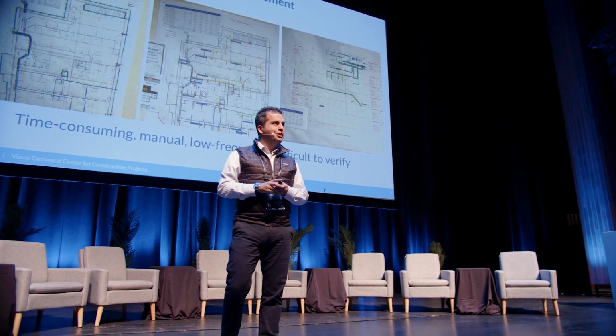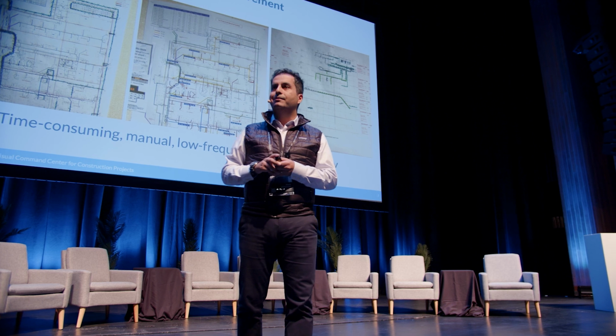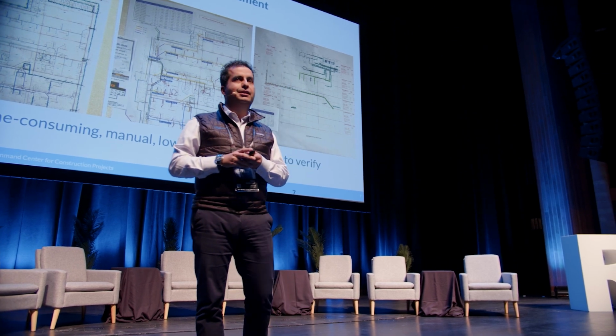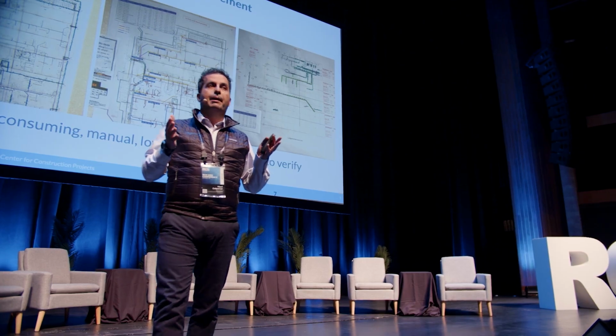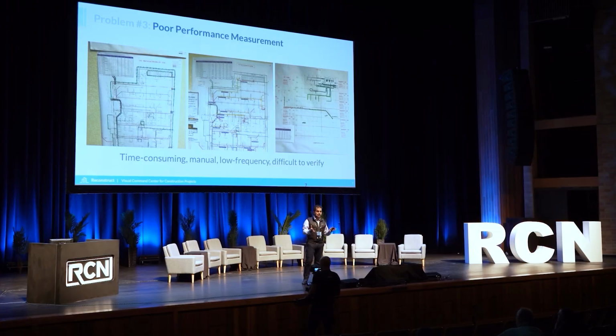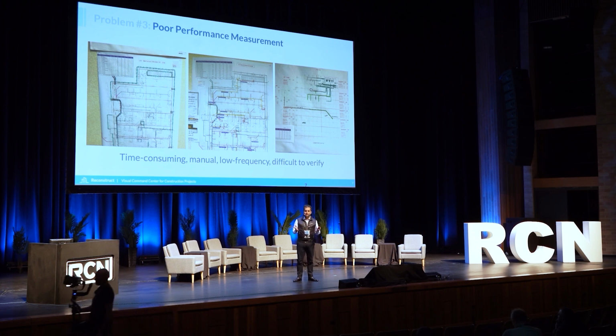This is from a modern electric vehicle plant in Michigan, a project that our company is engaged in. And as you can see, even in 2023, from the time that the problem happens to the time that we learn about the problem, it takes us a week. Why? We wait for the subcontractors to show up in a coordination meeting, and we ask them to stand up and color code the areas that they have been working on at the site. So not only is there a delay, and these issues are stacking up, unfortunately this feedback on the plan goes into your 2D drawing.